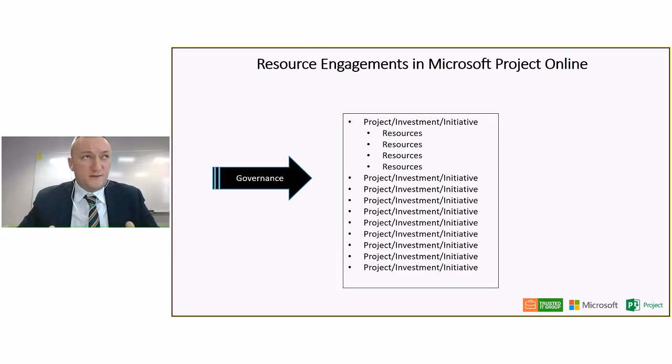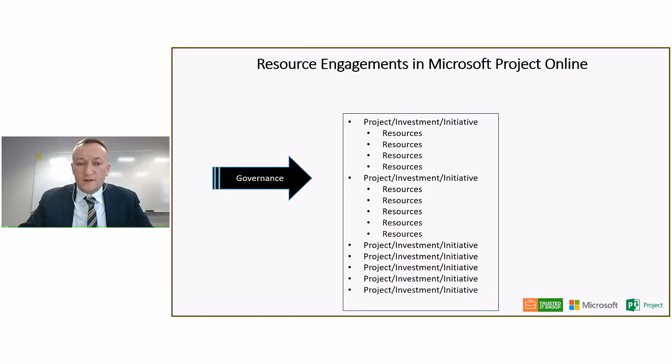by having the list of projects in front of ourselves. Then we can say, okay, on this project, I'd like to have these people working on it. And for the next project, I want the other list of people working on that project. Make it very simple to understand. Again, list of projects in front of you and list of resources in front of you. And then we can start saying, okay, this resource may or may not be working for this period of time, or maybe we should assign this person at 50% of his time, this person at 10% of his time, and maybe he is needed only at the end of the project.